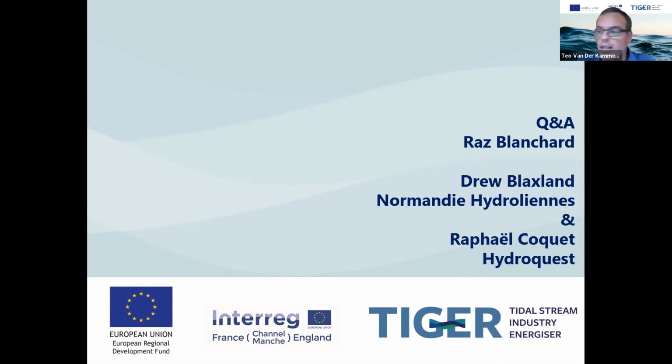Thank you very much, Raphael. And Drew, if I can bring you back on screen as well. So we've got a few questions still outstanding. First one aimed at Drew: are Normandy Hydrogen still planning, or will you be doing any procurement for the Met Ocean and environmental surveys for the Ras Blanchard site? Yes, we will. I just answered that one online, actually. We've already got a tender out there, as I said, for the ADCP deployment for the ocean data, for the flow data. And then we will be going out later this year, Q4, I think, for a more detailed survey of the area.